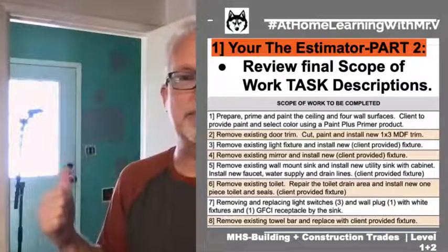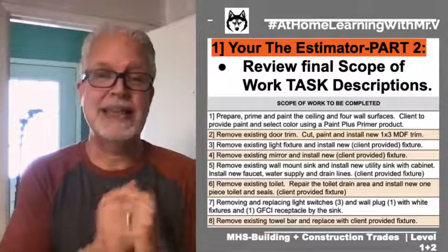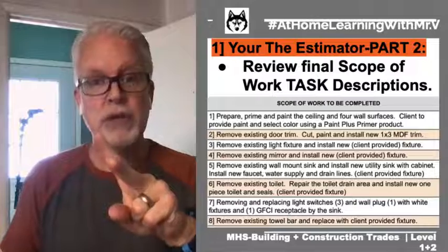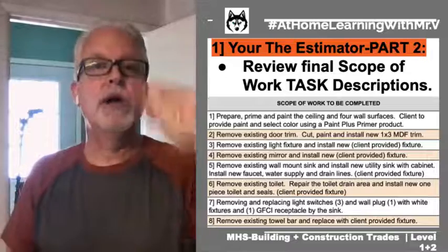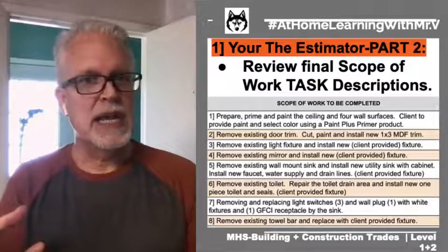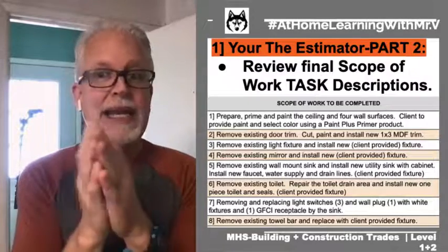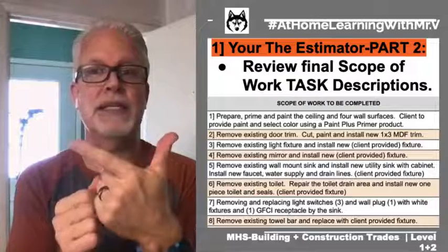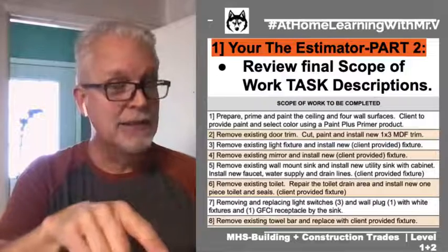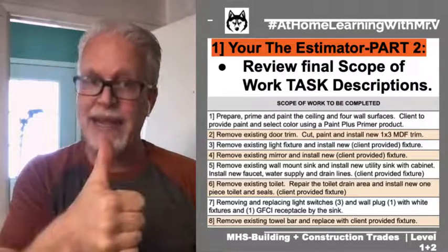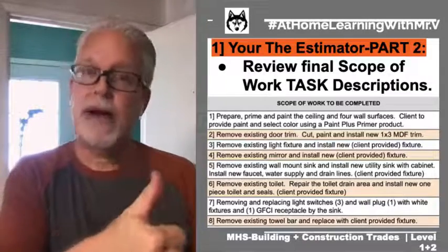So my job, I put some tests on, it dried back, it looks really good, which I'm totally excited because I think we can do it in a 2-coat process, but I won't have to do a separate primer plus the top coat. Here's the good hint. They now make product where they combine those two together and you get kind of a 2-in-1, right? You get a primer plus a top coat. So in the description that you're seeing, a paint plus primer product means they can buy 1 can of paint and I can use it for the priming step and I can use it for my final color.